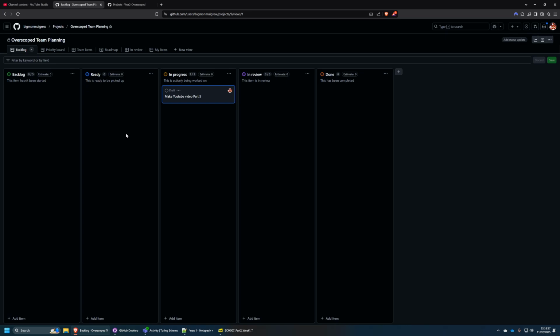This board is about communicating and making sure you don't waste time. If you have free time to work on a job that you've not already been assigned, looking at this should be the first thing you do, but make sure you update it, right? So when I've completed my task and I've made my pull requests and I'm waiting for it to be checked over, I'm going to move it into in review.